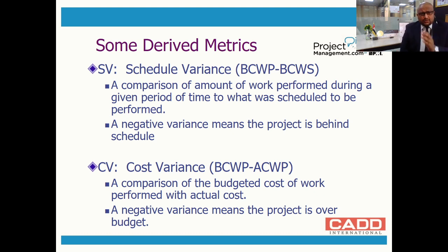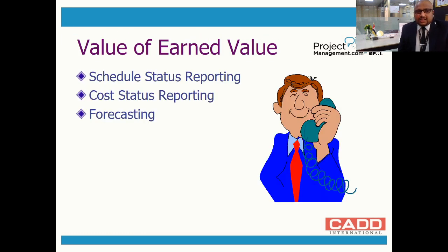Cost variance is earned value minus actual value. You have completed 1.5 rooms, which is about $1,500, but you gave him $2,000 at the end of day 2, which means again $500 over. We are running over the budget. You have to come up with solutions. So these are the derivatives you are getting. Also in the cost indices methods, you are getting the same thing.